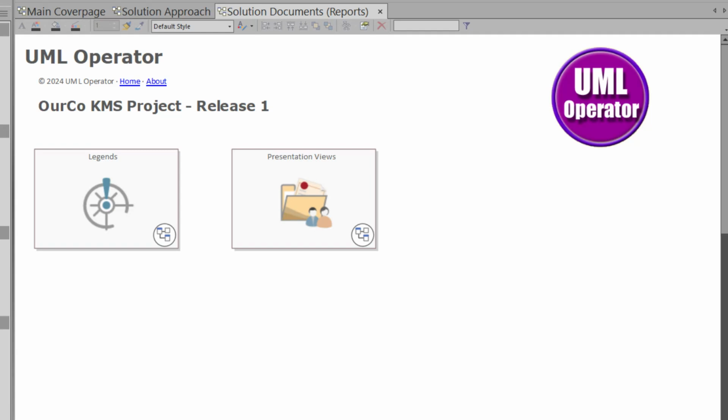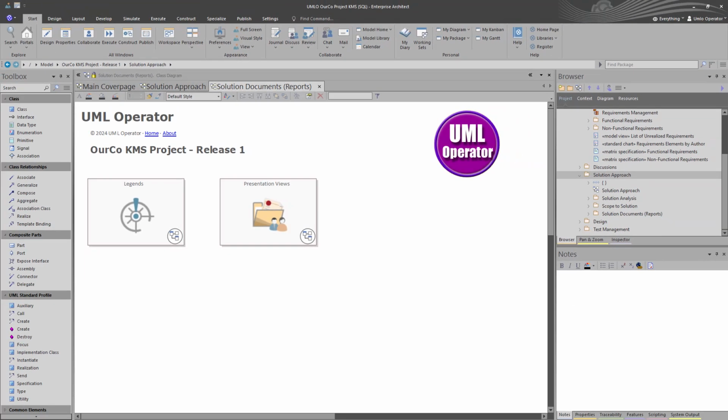So clean up unnecessary baselines. It's kind of important, along with versioning, when you're doing reporting to make sure that your baselines and your versioning are correct prior to at least formal reports. You're going to do ad hoc periodic reports for a particular presentation or collaboration, and you're just doing a quick report for folks to read prior to that session and other matters. But make sure that you're cleaning up unnecessary baselines and your versioning is accurate.